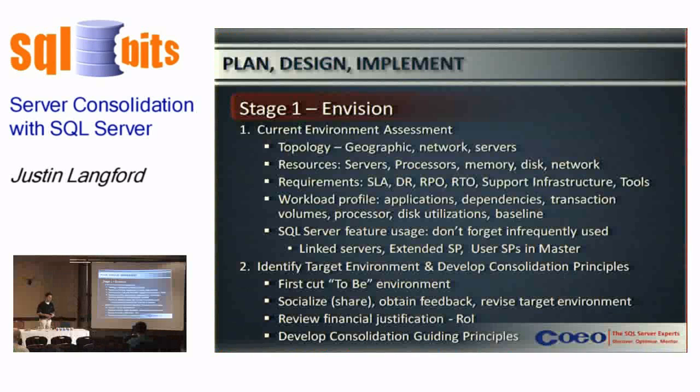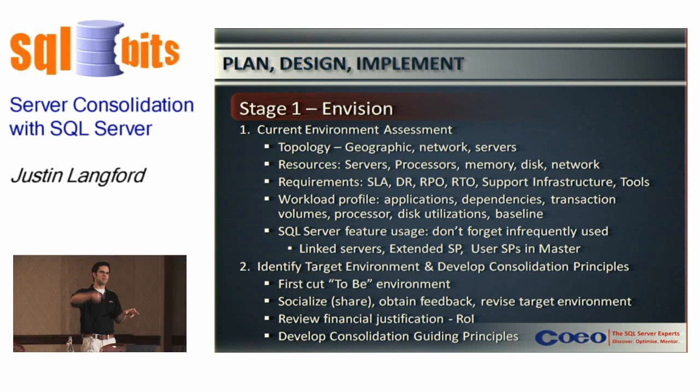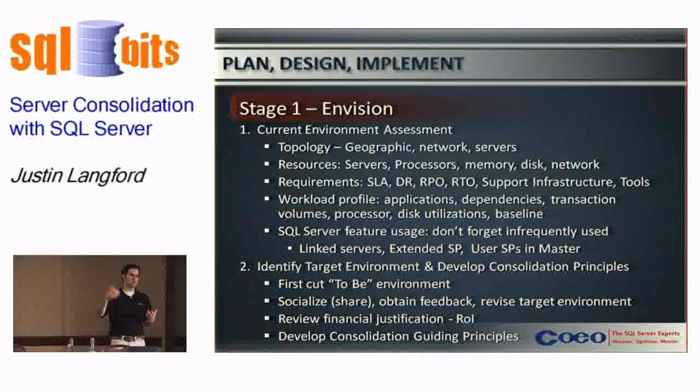So once we've got this inventory, it's a really good idea to look at the applications. So we then make a list of applications and make a matrix to say, these are all the databases that we've got, these are all the applications that we've got, and these are the databases which are used by each application. Once we've got that mapping, we can start trying to find vendor management relationships within the organization to try and work out who supports which build of SQL Server and make sure that we've got buy-in from the business units as we're progressing.